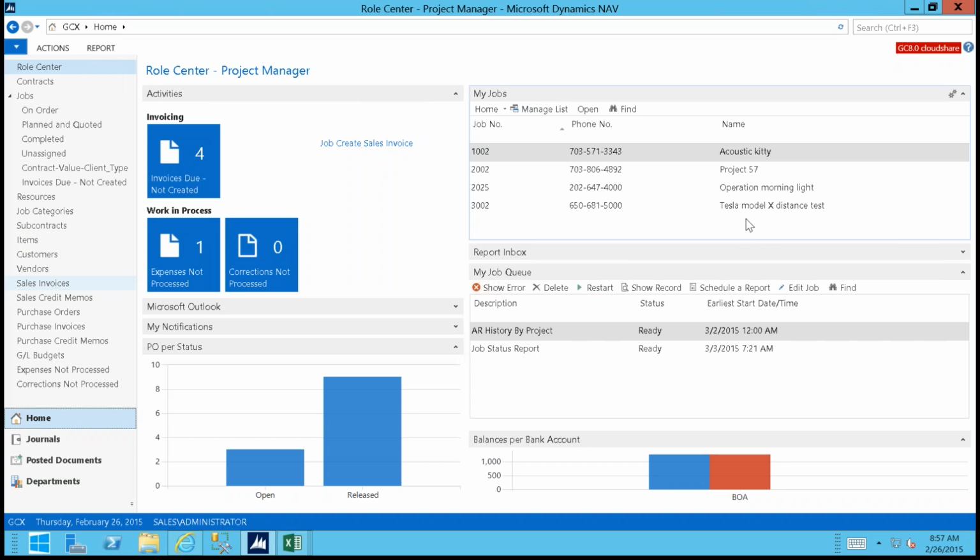All right, here's a question that asks what are the primary features you added to NAV to handle the unique requirements of government contractors who need to demonstrate DCAA compliance? So as folks on the phone that have worked with the federal government know, it's not just about the system. It's also the fact you've got documented processes and you follow those processes. But the things that we've done is everything around improving the allocation process so it meets the unique needs of a government contractor. There's other areas around reporting. We've incorporated key reports that the government looks for. And then in terms of segregation of costs, so segregating direct from indirect, allowable from unallowable, there's a whole methodology around that. So that, along with some of the key things in the timesheet system that we mentioned earlier, so stuff regarding time entry in advance and tracking all the changes inside the system.